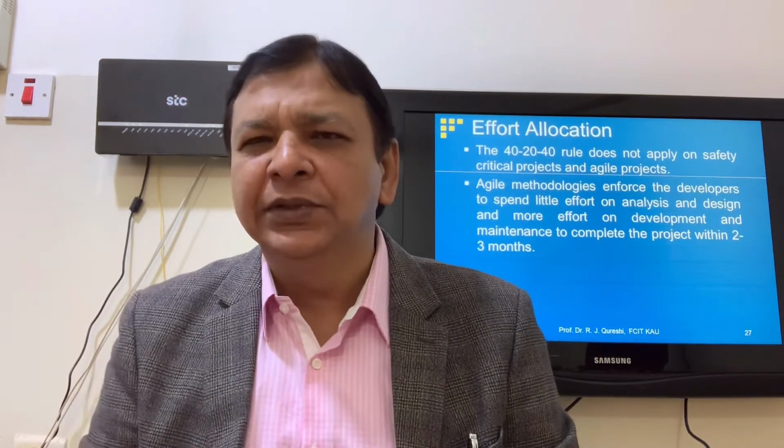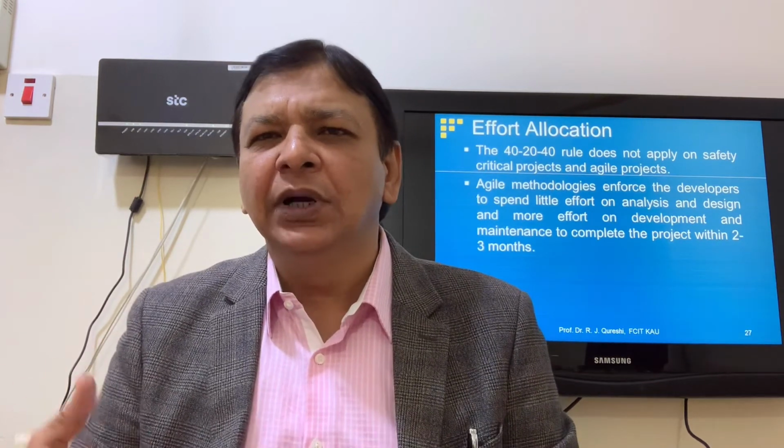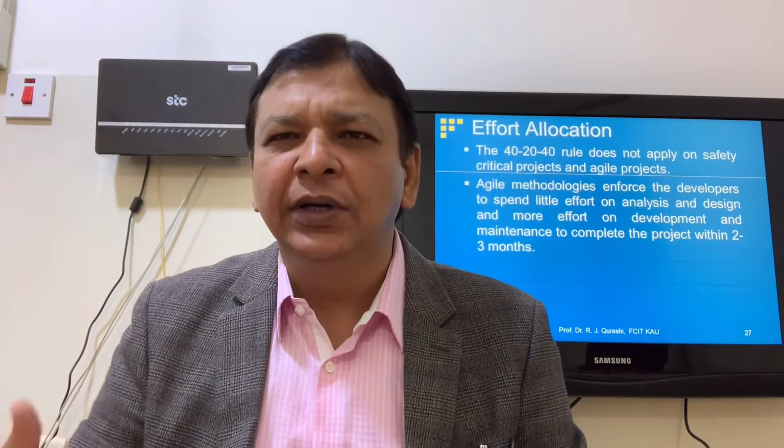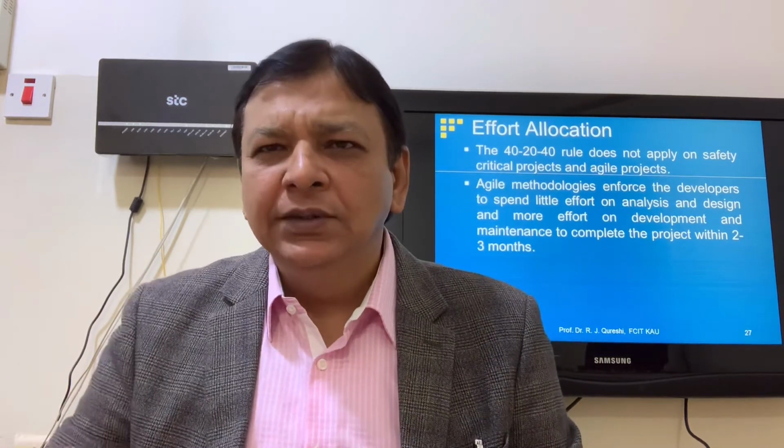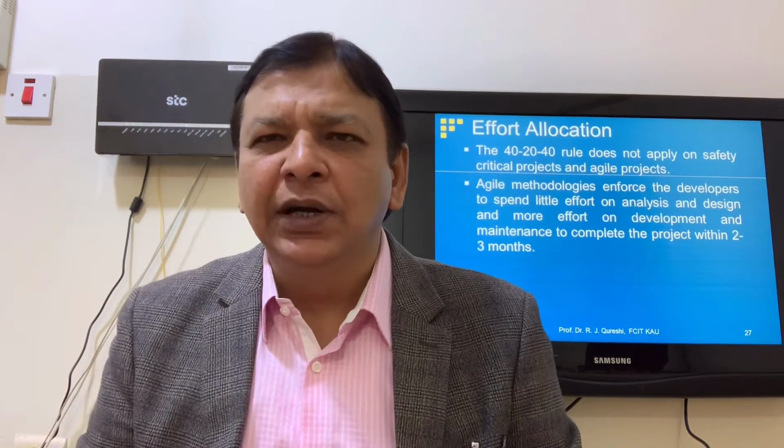60 to 70% effort will be spent on planning, analysis and design, and 30 to 40% on coding, testing, maintenance and the rest of the activities. That is the case of safety critical projects. The 40-20-40 rule is not applicable.